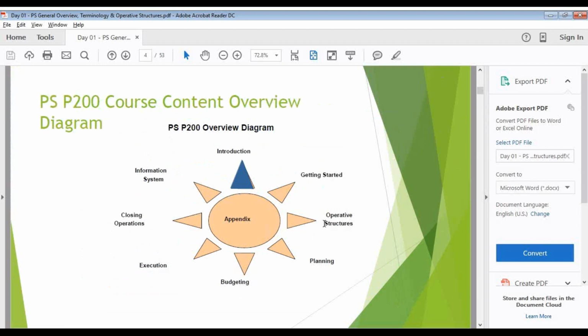Yeah, the same thing PS uses here. PS is based completely on PERT and CPM. So how the activities will trigger, whether it is start to finish, finish to start, it is properly integrated. If we look into the activities part in the CJ20N T-code, you will see what is the relationship existing between this activity and another activity. We can establish this one.